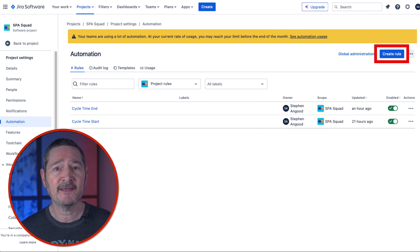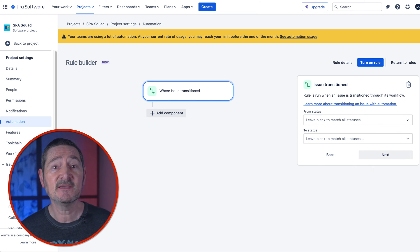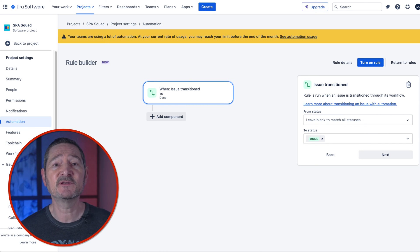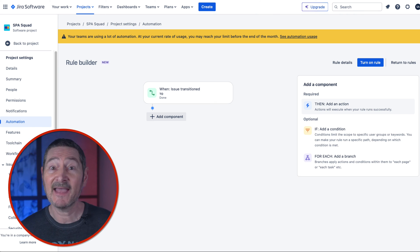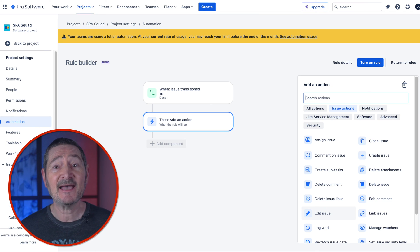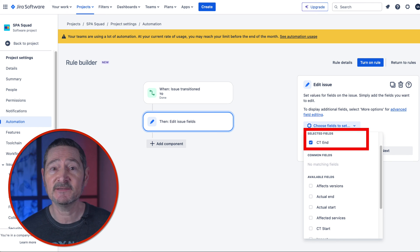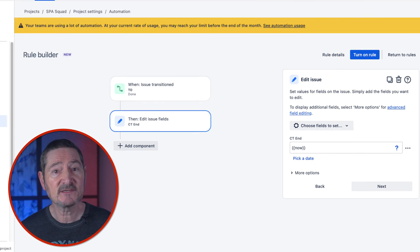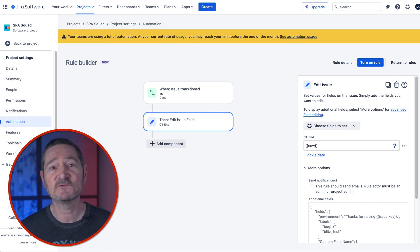Now for our last rule. Click Create Rule again. As before, you'll be presented with the trigger screen. Click on Issue Triggers under Add a Trigger and select Issue Transitioned. You'll see the issue transition box appear. Here you're going to select when your story transitions to Done — I'm only interested in when a story transitions to Done regardless of where it's come from, so I'm only going to select Done in the To Status. Then select Next. Now click Then Add an Action, select Issue Actions, then select Edit Issue. In the Choose Fields to Set drop-down, select our custom field CT End. In the box labeled CT End, type `{{now}}`. This is the Jira smart value that will put the current date into our custom field. Click on More Options and deselect Send Notifications. Then select Next.